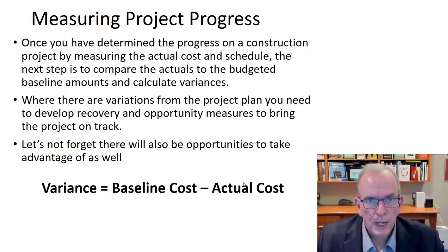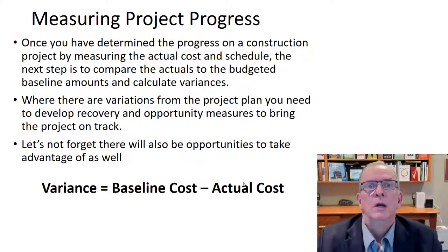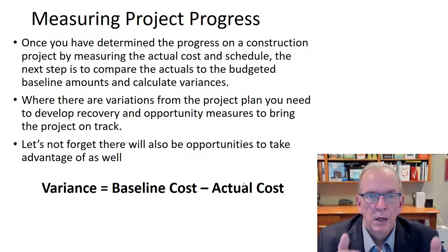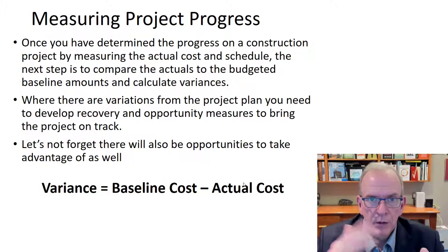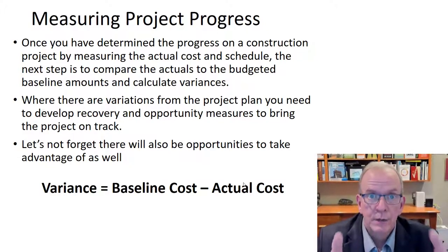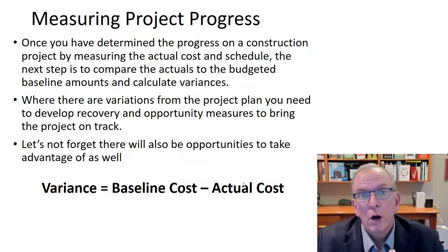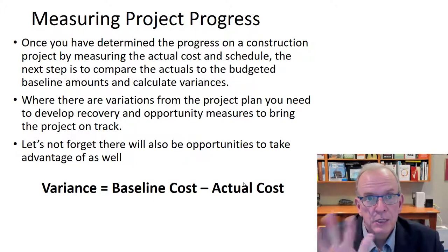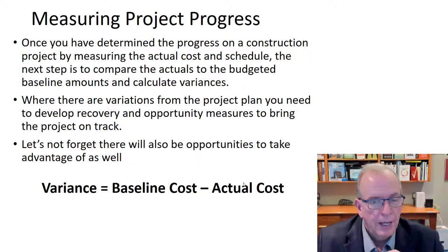We can look at this as a methodology for developing a recovery. And we talked about the direct method in the last lecture. Remember, detect along the critical path. Look more immediately than towards the end of the project. You want to fix it now. Reduce: look for opportunities to make cost savings, and you should always be doing that. That's lean thinking, which is to reduce or eliminate waste. In other words, you're looking for the no or low cost solution. That's the R in direct. E, experiment: try different things, look at it, review it, sensitivity analysis. C, get the commitment of the people involved. And T, that's going to be building confidence in the team and getting you back on track.